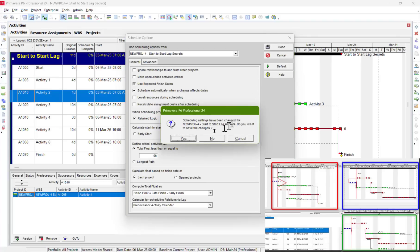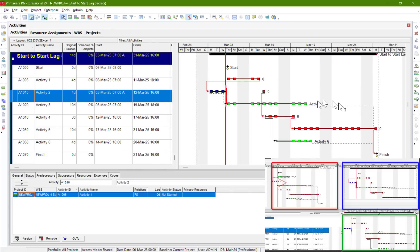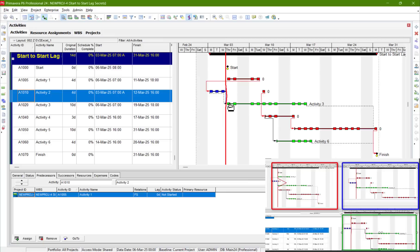Schedule now — everything remains as it is, except the start-to-start relationship. It now shows that activity 3 can start any time because the lag is zero. It can start any time from the progress date.